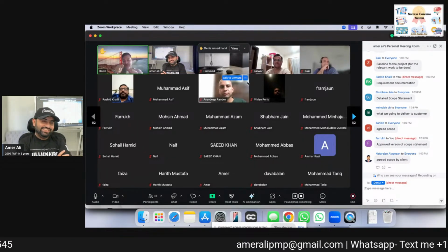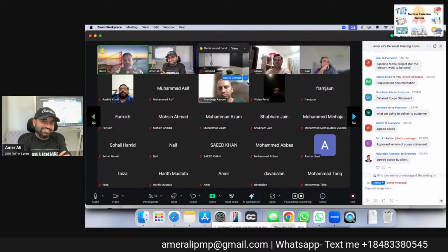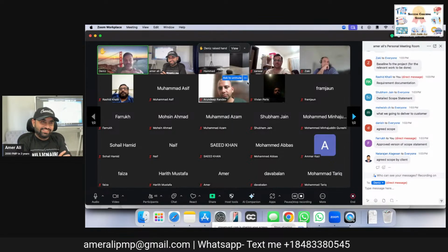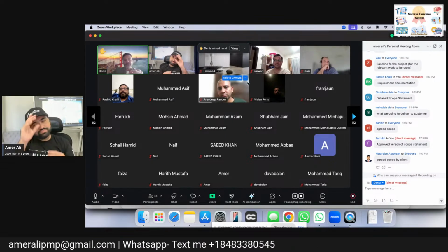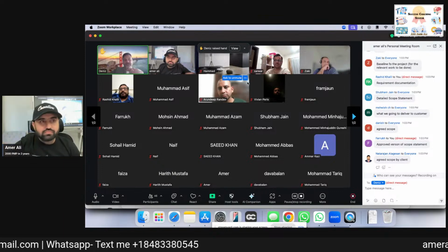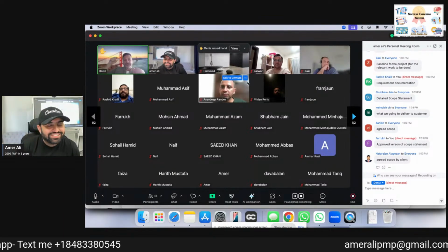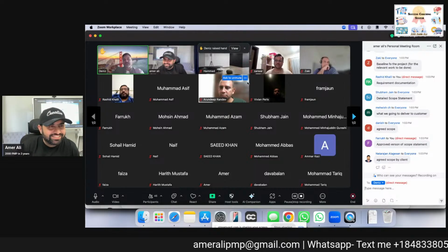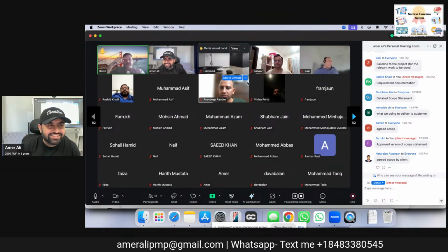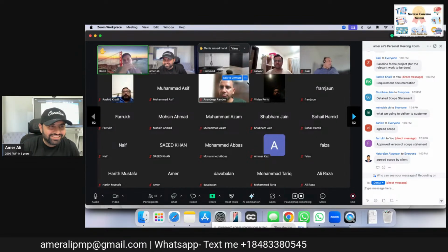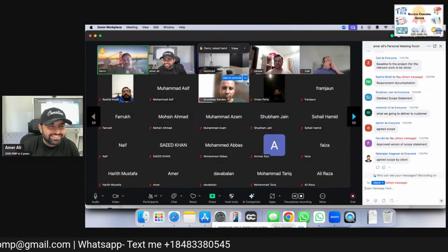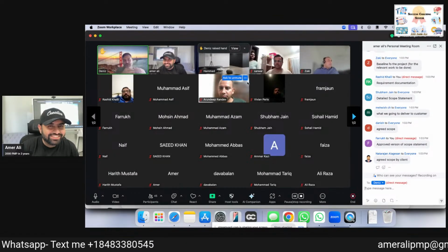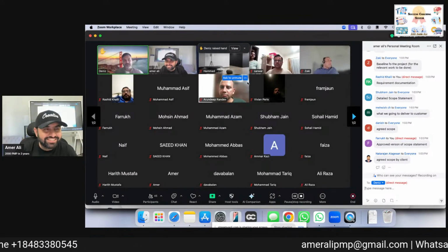In my mind, when I have the scope baseline agreed with the customer, and I have the definition of done on my side, I use that to validate internally, and this should match the scope baseline because that's what the customer is saying. So the checklist I have should match the scope baseline.